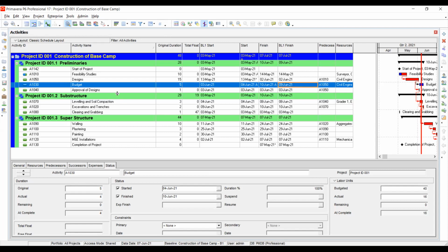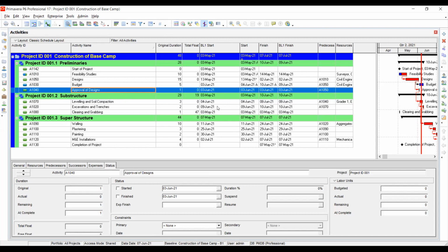So in case we go and update another project, the baseline will stay as the date we set. For example, we had the start date. Then after agreeing that this is what we're going to start with, set it as a baseline. So for it to never change, the start can change, but the baseline start doesn't change because you've already set the baseline, unless you go back and restore or delete the baseline. So if you could maybe update this.